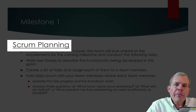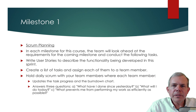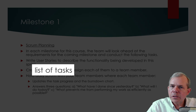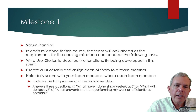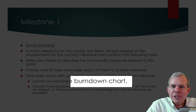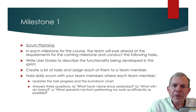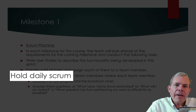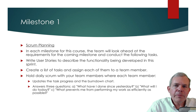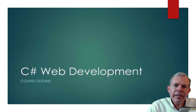Make sure you're doing the scrum planning exercises for each milestone. You and a partner will work together to create the application — maybe one works on the registration page and the other on the login page. We want to document how that goes using a burndown chart to estimate hours planned for the two-week sprint versus hours actually spent. When you're done, your progress should match what you planned. Take a list of what you have to do, hold daily meetings with your partner, check for problems — the earlier you catch them, the more successful you will be.